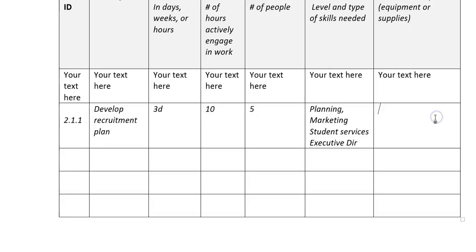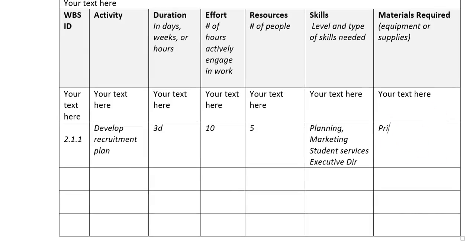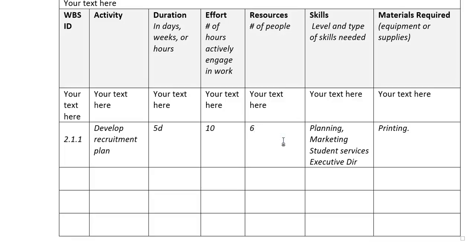There aren't any particular supplies we need, except maybe printing, but that could be in-house. If we have to get the executive director involved, assuming we can go from start to finish in three days is really unrealistic in terms of duration. So maybe we make that a week — let's call that five days. We're going back and revising our plan, and that's actually a sixth person involved. The hours of effort might have gone up to 11.